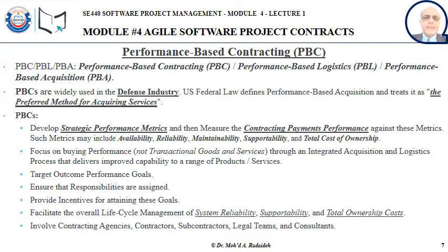Okay, this slide elaborates on performance-based contracts. We refer to them as performance-based contracts, performance-based logistics, performance-based acquisition. They are widely used in the defense industry, and they're referred to as the preferred method for acquiring services. Now, performance-based contracting develops strategic performance metrics and associates those measures or metrics with the contracting payment performance or the level of payments.